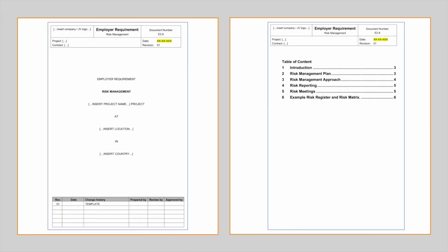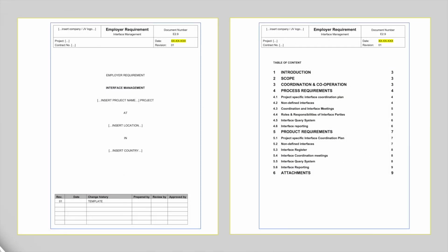The contractor shall prepare and maintain a risk management plan, risk registers whereby the risk owners ensure that risk and their mitigations are identified, assessed, implemented, tracked, and reported. Defining all the interfaces with all the roles and responsibilities of the interface parties is the cornerstone for good interface management. Weekly meetings to discuss the interface items and resolve issues will enable better coordination and avoid unnecessary delays.